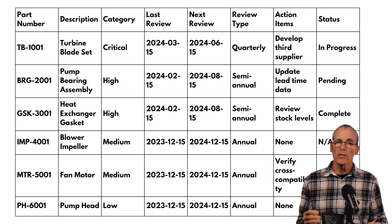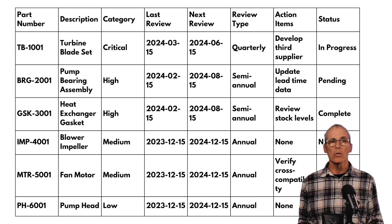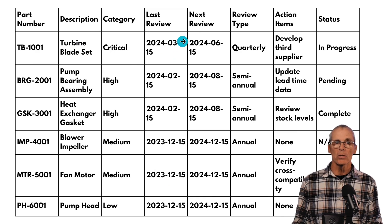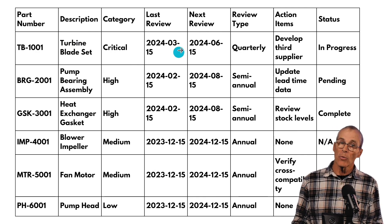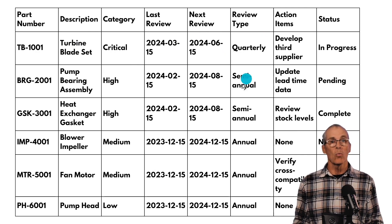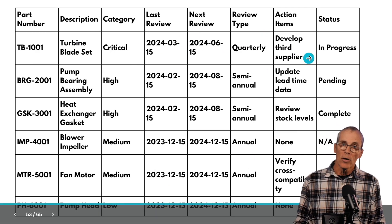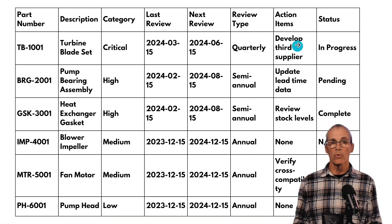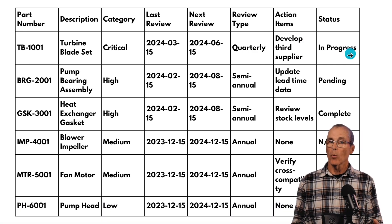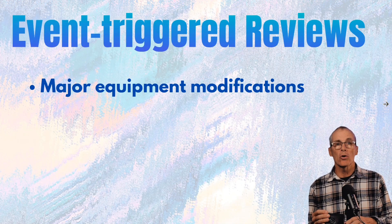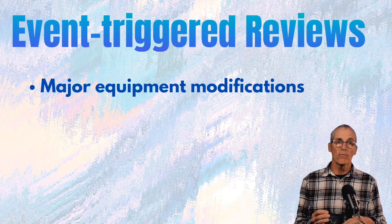This gives you an idea of what that tracking sheet will look like. You can see we've got the part number, description, how critical it is, last time it was reviewed, the next review date, the review type, action items from those reviews, and the status of the reviews. That's how we keep these things current based on review frequencies.